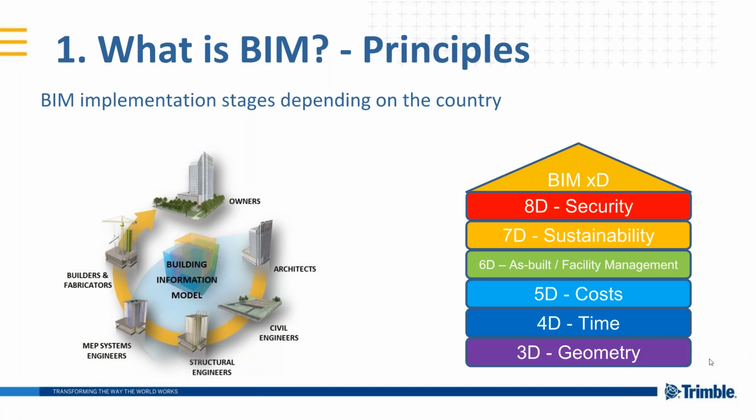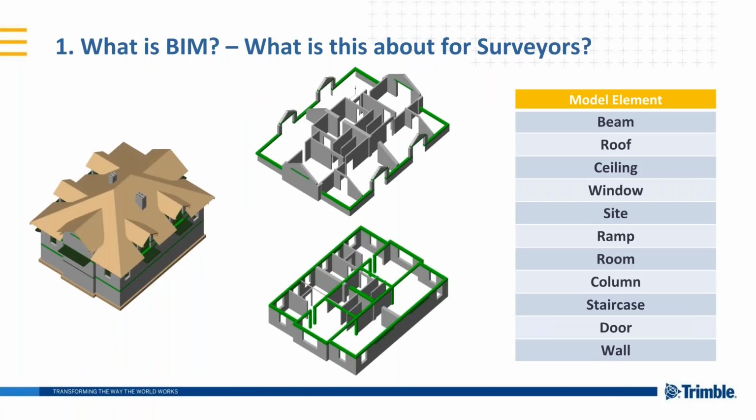So for example, if we provide a whole building as a BIM model, the company, our contractor, can make a query to the system and ask how many windows have to be changed in levels 0 to 10, how much it would cost, and what the timing would be to bring each amount of windows to the site in order to be mounted, all of them. So it's very related, the geometry to the time and to the cost, so that we can make better decisions, and probably not ourselves as surveyors, but it can help the next part in the chain to make better decisions.